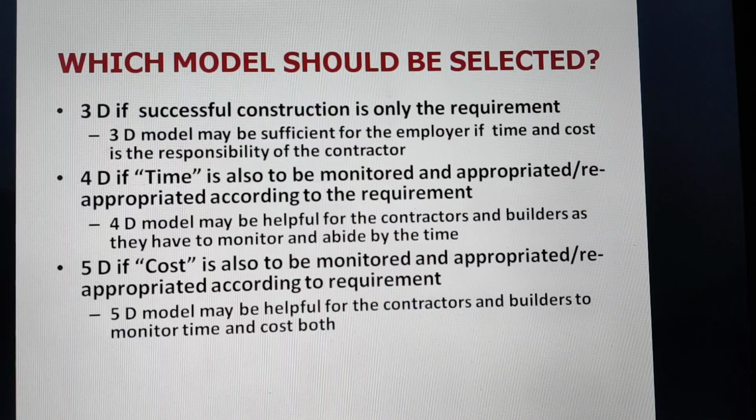In my view, 3D is okay if successful construction is the only requirement. Suppose an employer or engineer in charge or client has given a contract to a contractor, and the contractor's requirement is to give the building within a certain time and within a certain cost. Then a 3D model may be sufficient for the employer if the time and cost is the responsibility of the contractor. 4D will be good for the contractor.